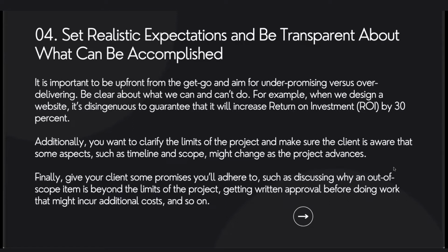I'll give you another example, a simple example, and you guys will get this. Let's just talk about websites. We build a site. They might be cool with the first draft, first revision, second revision. Then they hit up our project manager and say, I want this custom illustration. I want you guys to create this custom, and I want this custom, and I want you to add this. And whoa, wait a minute. That's a problem, because that wasn't what we quoted. Out of the blue, they want our graphic design people to create custom illustrations, all this custom work on their site that wasn't part of the scope, the proposal, or the deliverables. That can be a serious problem. Not knowing the limits of time and scope is really important, because that will screw everything up.